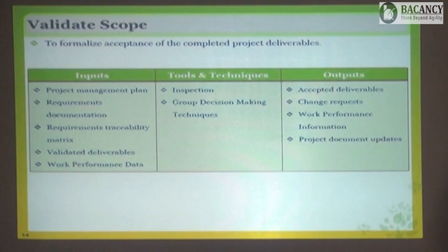Okay, so we have this two-step check. First is the project performing team is doing a QC, then they are passing it. Once it is passed, then it goes to the customer, and the customer is the final authority who will decide whether it is as per the requirements given or not. Means validate scope means a user acceptance test. Absolutely correct. UAT. But yes, quality check is supposed to check all those 4 parameters, isn't it? Yes, we have already checked it from our own assumption or our own parameters. But this will have to be accepted by the customer also.